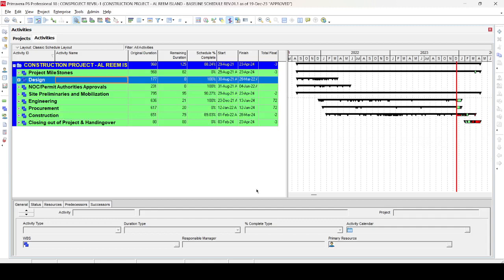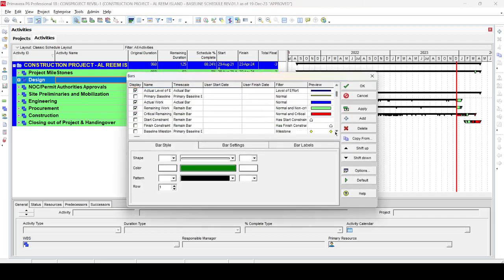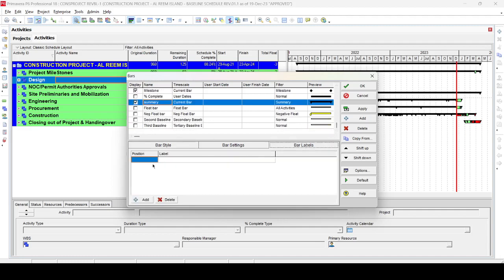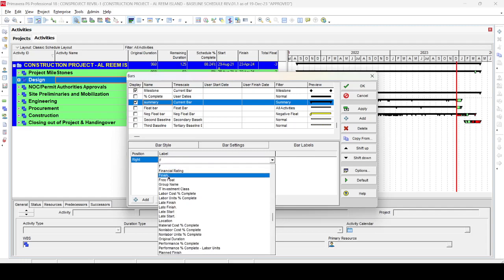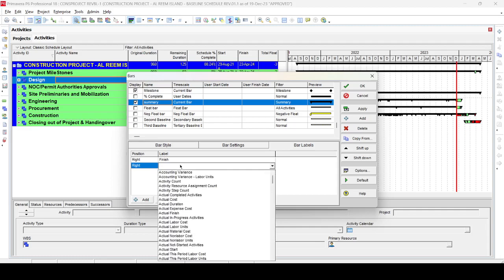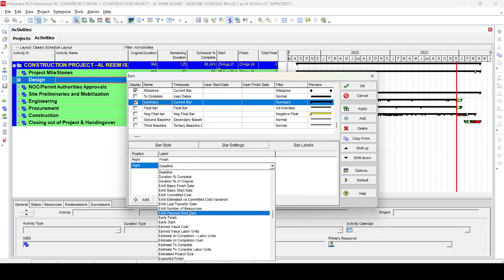We'll see how to remove those. Also, if you're doing this for the first time, you may encounter another problem: if you go into the Bar dialog box and then go to the Summary bar, in the Bar Labels section you can add information — for example, a finish date, or an activity name, or whatever you want to show.